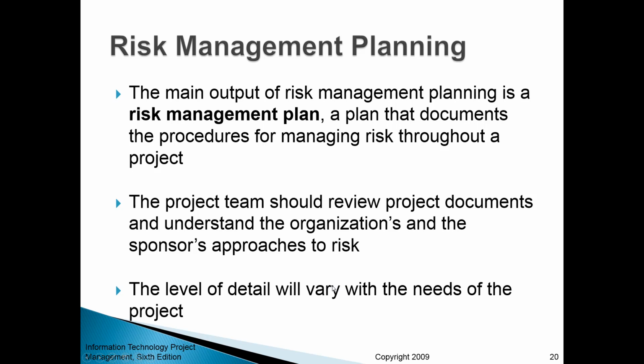Also, there are some risky startup projects where it's not clear what exactly needs to be done. Because it's not clear what exactly needs to be done, you may not be very clear about the risks, because it's hard to analyze something that you don't have full awareness of. So in that case, the risk management plan can be very agile and sketchy, so that you can respond to potentially any risk, any situation. While again, if you're doing something that is more mundane, something that is very well understood by the company, you may have more detail in your risk management plan. So once again, the level of detail will vary depending on the nature of the project and the needs of the organization.